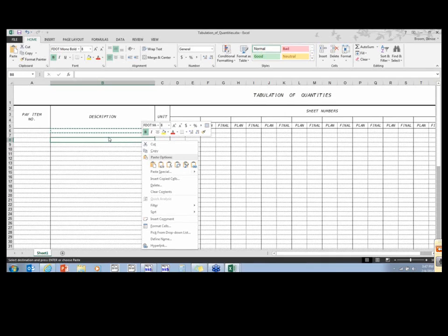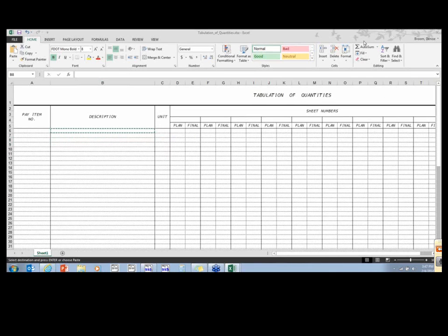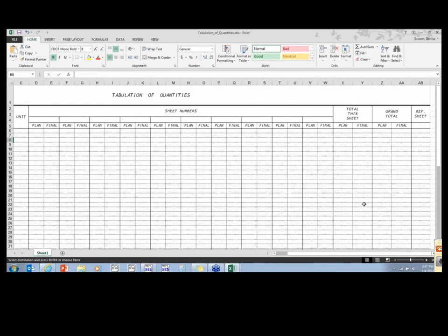Okay. Well, the answer to the first part of the question is that the grand totals will be shown on the last table of each sheet. If you have a multiple page summary box, for example, your asphalt might string across 4 or 5 pages. You'll have a subtotal on each of the 5 pages and a grand total on the last page. Okay, I got that part of the question now. I missed that. Okay, summary of pavement, and I'm pretty sure I have, and actually the curb and gutter that I just did is another good example.